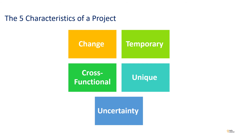Fourth, Unique — every project has its own unique set of characteristics. Repetitive tasks done the same way repeatedly are not considered projects. Fifth, Uncertainty — in a project there are enough variables that it is impossible to predict everything about the outcome with 100% certainty. When uncertainty happens, it always produces risk. Using these five characteristics you can understand what qualifies as a project under PRINCE2: a temporary organization created to deliver one or more business products according to a business case.